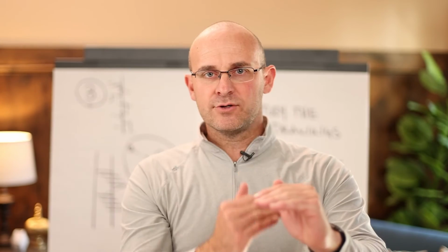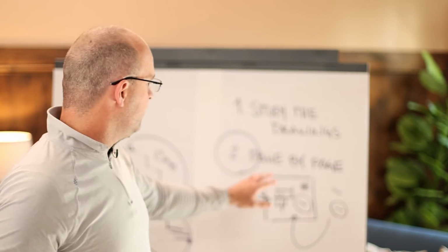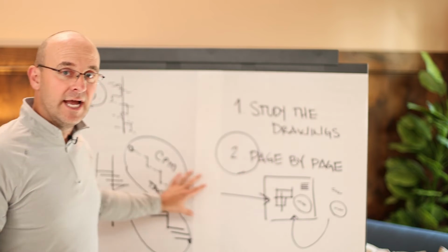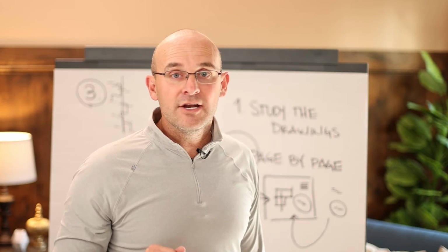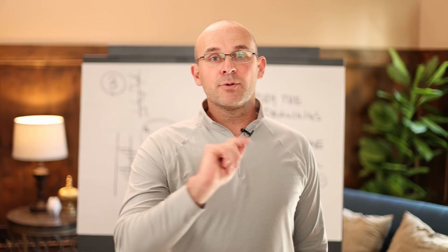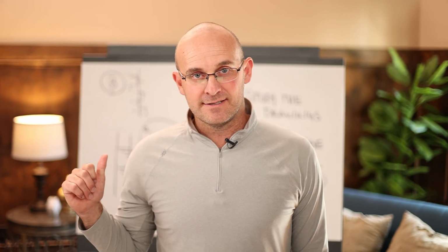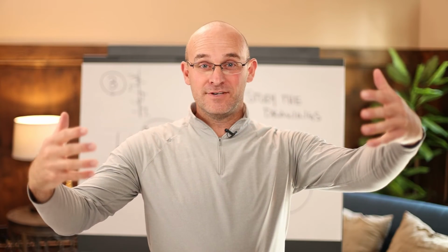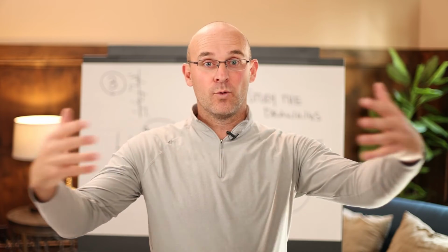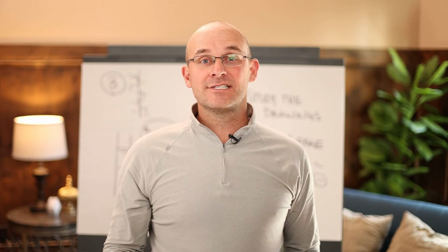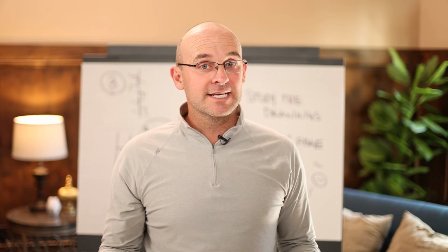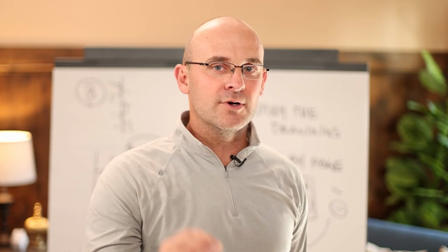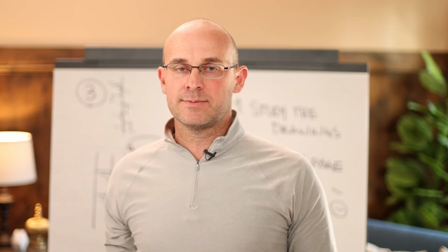And so even if your schedule isn't right the first time, meaning that you've gone through and you've studied the plans, you've made a plan page by page, and you've networked that plan, it doesn't matter if it's right. In fact, it's not right. It's a perfect schedule if you can see it. And so that's where tacked, putting it on one page, the last planner system, putting it on visuals so that your trade partners can work with it and collaborate with it, and using systems like Scrum end up making perfect schedules because everyone can see it. So that's the single most important characteristic which enables the other tips that I'm going to give you.